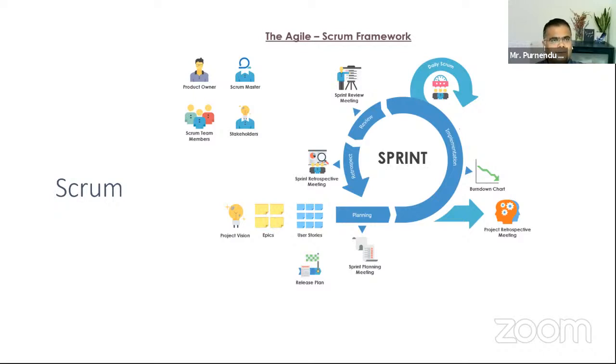So if you find something which didn't work well, say for example, when you defined the user story, you identified that we need to have some cloud solution implemented. Now you went ahead and did just one cloud evaluation, and said, okay, I just went to Microsoft and found it. When I implemented it, I realized the cost is too high. By the way, I don't mean that Microsoft cost is too high. I'm just putting this as an example in a context. So in my retrospective session, I might say we should have actually evaluated 3 more vendors to find it out. Okay, that was one way.